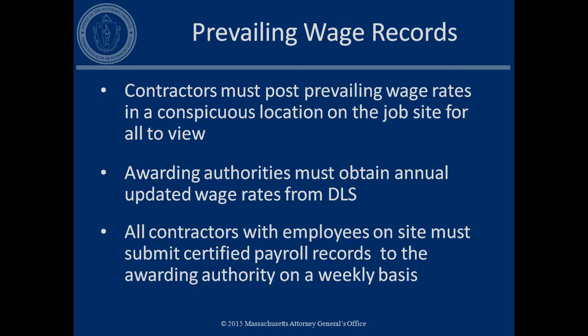All right, so a couple of other points when it comes to prevailing wage requirements: posting requirements and records. The contractor has to post the prevailing wage rate in a conspicuous location on the job site. So at least in the on-site shop, if not on the outside of the shop, hopefully. If you're a project manager or a clerk of the works or just in an oversight capacity at a public construction project and you do not see a prevailing wage rate sheet posted, it may be a red flag that workers are not receiving the prevailing wage.